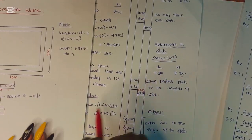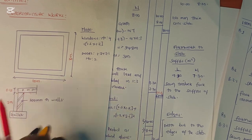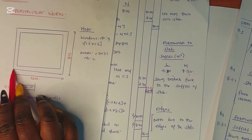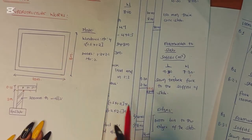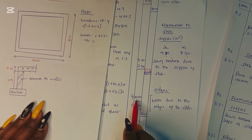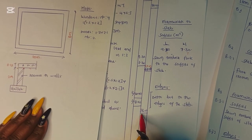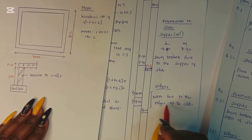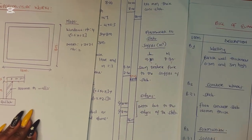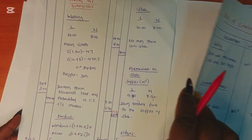Now let's get the formwork to the edges — these are the sides that support the concrete. The edges run along the entire length and the entire width, so that is 10.00 multiplied by 2 and 8.00 multiplied by 2. That gives 20 plus 16, which totals 36 linear meters for the formwork to the edges of the slab. Now that we have all the quantities, we are going to prepare the BoQ.